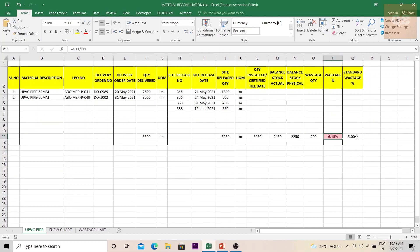You can put formulas to highlight whatever exceeds the permissible limit. Once this sheet is prepared, your project team and project manager can see, for example, that a 50mm pipe is being wasted above the permissible limit. The execution team can then be notified, a reason obtained from them, and they can be instructed to use materials more efficiently. You can prepare different tabs for different materials and keep a monthly update, monitored every month by the project team so proper actions can be taken for cost control.